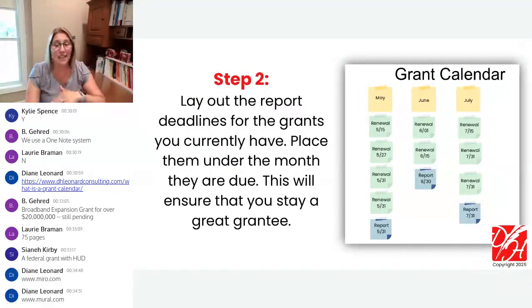And then I want to think about what reports are due. Whether you're responsible for the report in its entirety or not, having those reports submitted is absolutely essential to staying a good grantee and potentially getting to apply again. So now, ideally, you take a new color sticky note and you place those on the months where they are due.